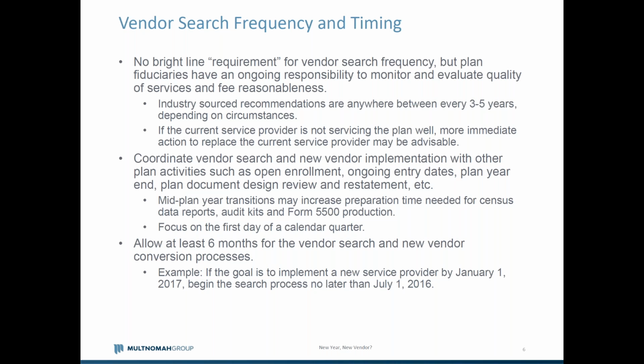We'll talk a little bit more about the search timeline. I would say as you think about this process, if you're contemplating making a change, I would plan at least 6 months for the search and implementation process. So if your goal is to make a change effective a certain date, you need to really back up at least 6 months to get that process started. So as an example, now, if we were starting a vendor search process, we would not likely be encouraging clients to be targeting a conversion date any sooner than July 1st of 2018.